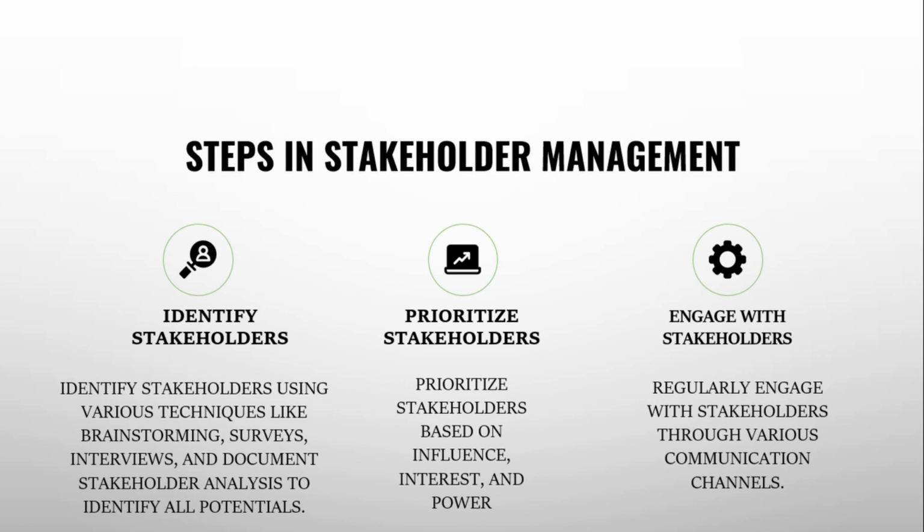Take, for instance, within project management, when you identify stakeholders, it is important to come up with a communication plan where you highlight stakeholders, highlight the mode of communication, frequency of communication, and then the type of communication tool that would be utilized. In this context, prioritizing your stakeholders would help you to effectively engage stakeholders.